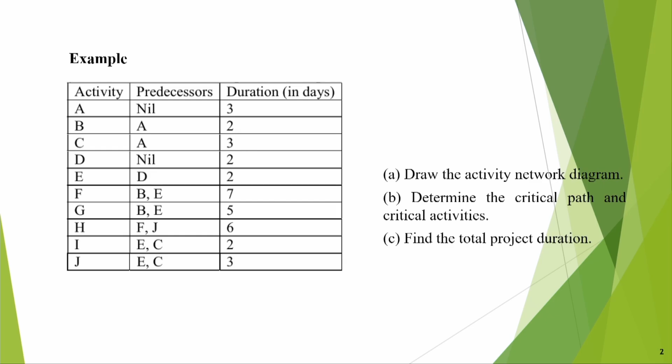Okay. So, you just see that if you take the sum of the activity times, it is 3, 5, 8, 10, 12, 19, 24, 30, 32, 35. So, apparently it takes 35 days, but no, the project time will not be 35 days, it will be much less, because some activities can be done in parallel. Say, for example, activity A has no predecessor and activity D also has no predecessor. So, both the activities can be done simultaneously.